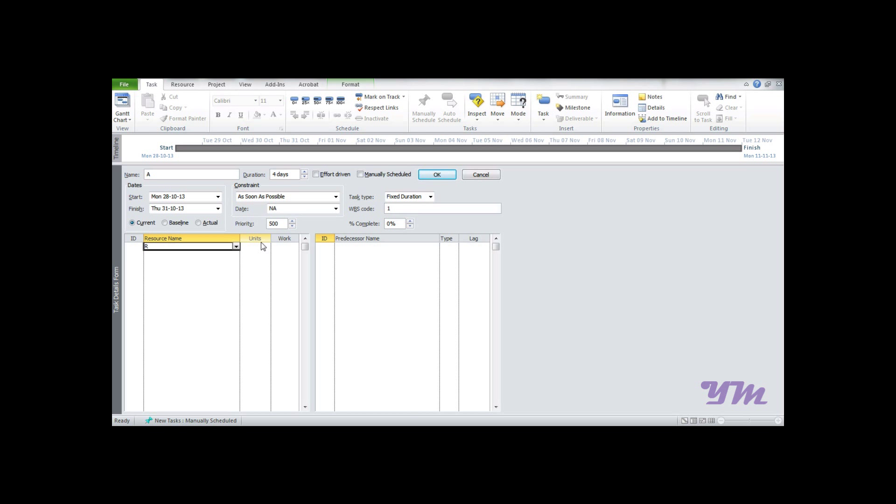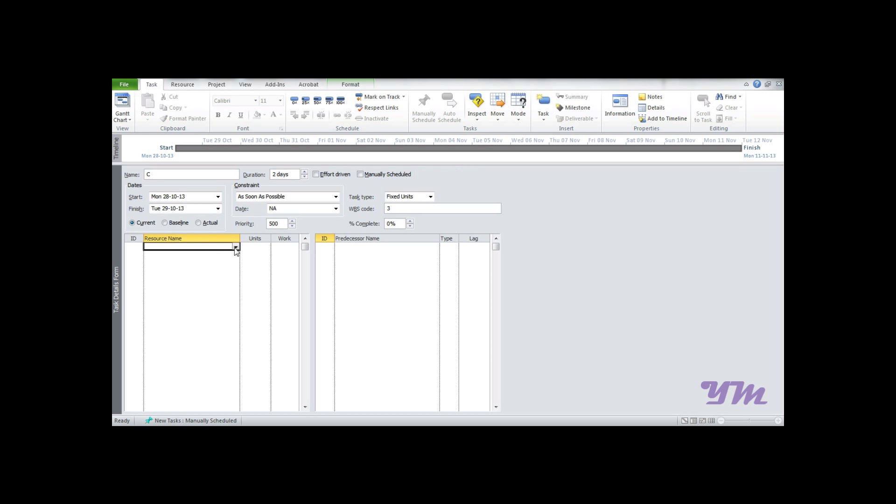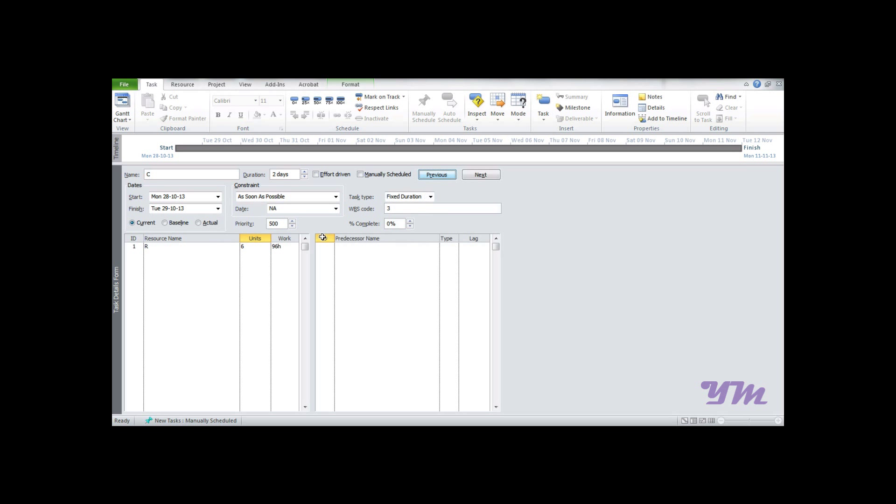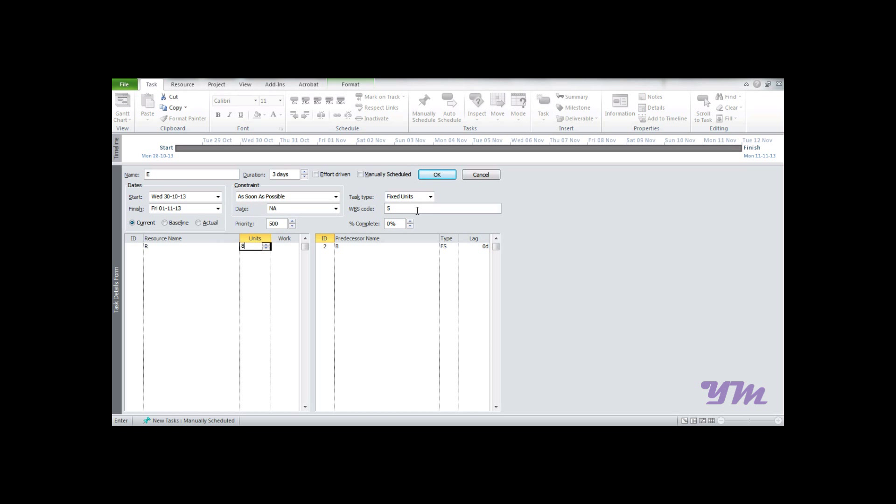The units are 9. Press OK and Next. For B, we have resource R with 3 units - change to Fixed Duration and deselect Effort Driven. For C, similarly 6 units, Fixed Duration, OK. For D, 4 units, Fixed Duration. For E, 8 units, Fixed Duration, OK and Next.